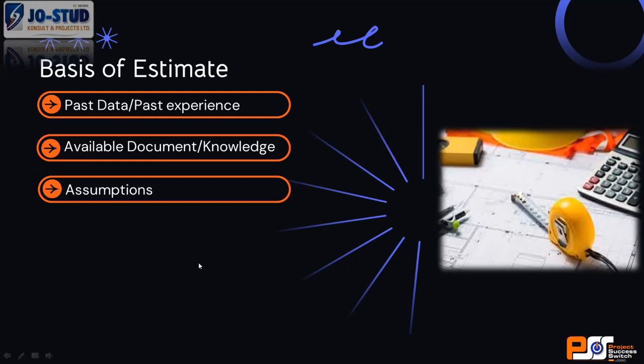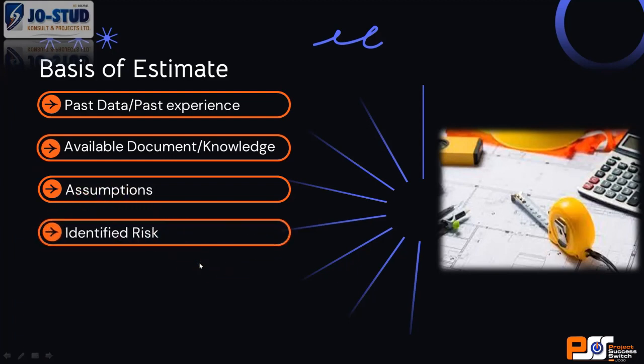Then you must always state something like, when I did this project, Nigeria inflation was 18%. I always like to state it there so that clients will know. When I did this project, I will tell them it was in 2021. I will state the year there. Those are assumptions that you need to state.